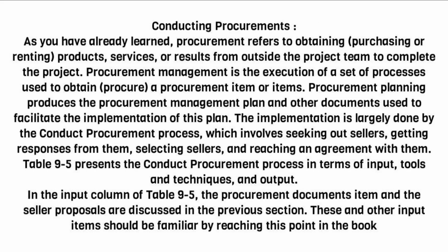Conducting Procurements. As you have already learned, procurement refers to obtaining, purchasing or renting products, services, or results from outside the project team to complete the project. Procurement management is the execution of a set of processes used to obtain, or procure, a procurement item or items. Procurement planning produces the procurement management plan and other documents used to facilitate the implementation of this plan. The implementation is largely done by the conduct procurement process, which involves seeking out sellers, getting responses from them, selecting sellers, and reaching an agreement with them.